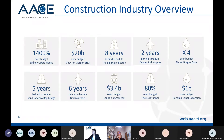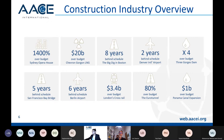Some examples: the Sydney Opera House was 1,400% over budget. Gorgon LNG was $20 billion over budget. The Big Dig in Boston was eight years behind schedule. Denver was two years behind. The Three Gorges Dam in China was four times over budget. There are many more, and this is why there is a reputation in the construction industry about projects being late and over budget.